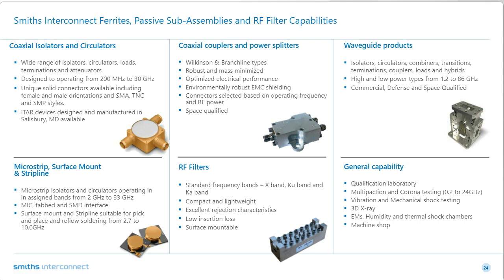the system level, or at least the subsystem level requirement, I would say that there's going to be a 3 to 4 month exchange back and forth on specs and overall electrical, mechanical, thermal, environmental concerns. That may get pushed down to 90 days, but I would say that the spec would probably be in place within 90 to 120 days. And depending on the lead time of the individual components within that multifunction assembly, I'd say that you're going to have another 3 to 4 months.